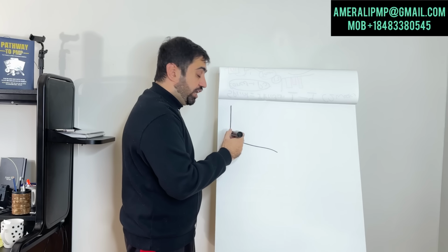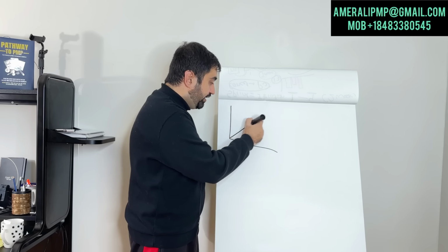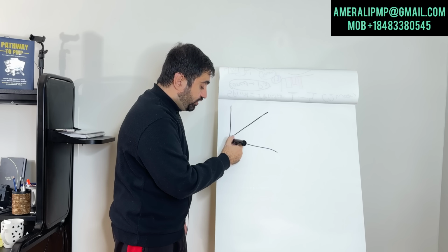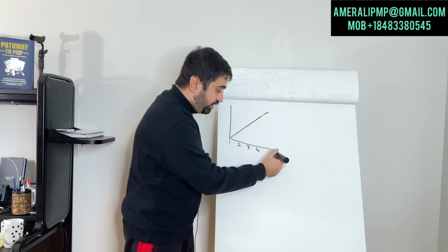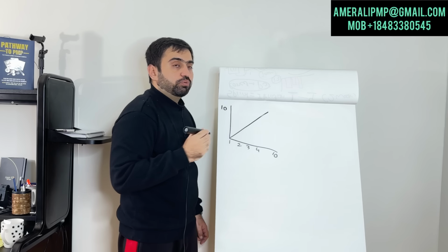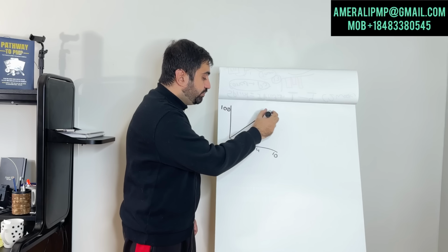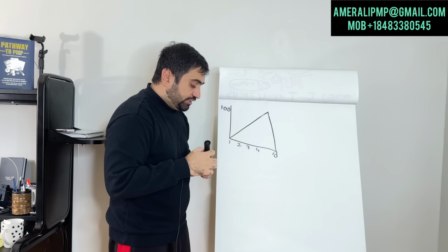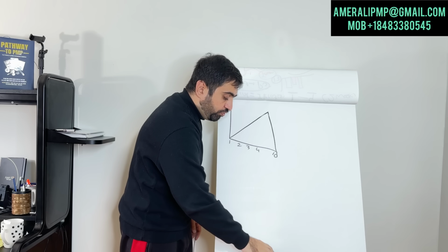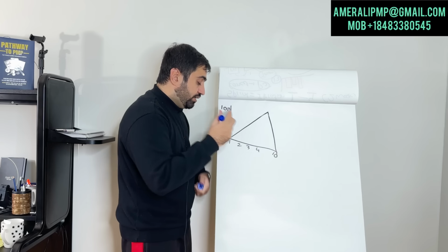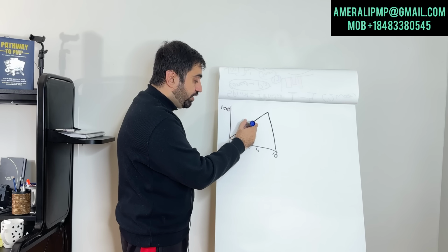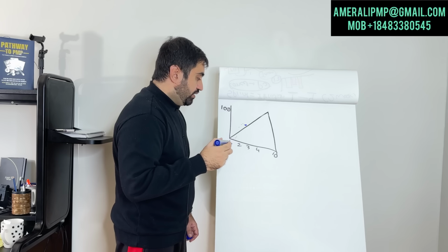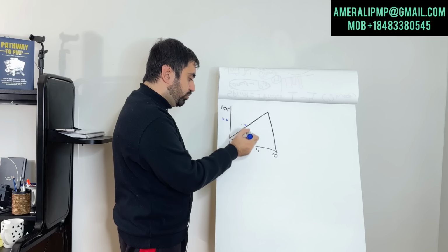the burn up chart. With the burn up chart, you will get an ideal burn up chart. Like this is the ideal burn up chart showing, okay, if your sprint is 2 weeks, 1, 2, 3, 4, 10 days, you have 10 story points, 100 story points. The ideal burn up chart will say that on the 10th day, you will be able to complete that. Okay. So as you move forward, you will actually plot your burn up chart. How are we doing? So let's say we are on day 3 and the burn up chart is somewhere here. Let's say it is 40 story points.